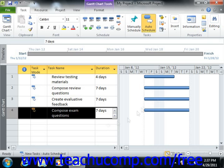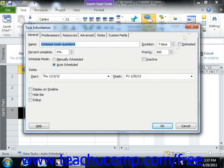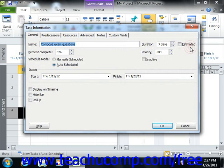Also notice that if you are using the Task Information dialog box for task detail entry, you can check the estimated check box next to any duration that you enter in order to explicitly define the task as an estimate within the task list.